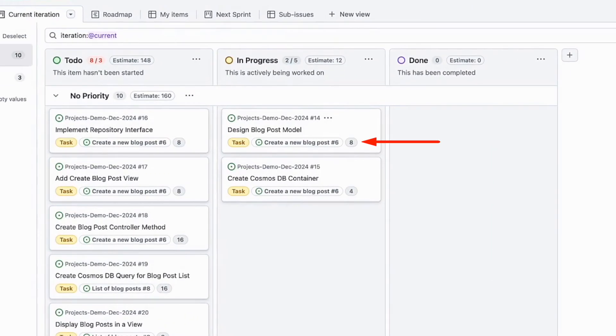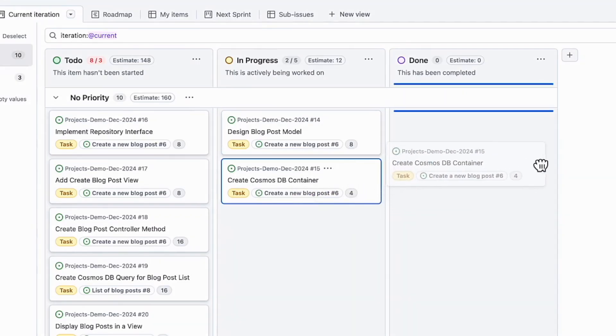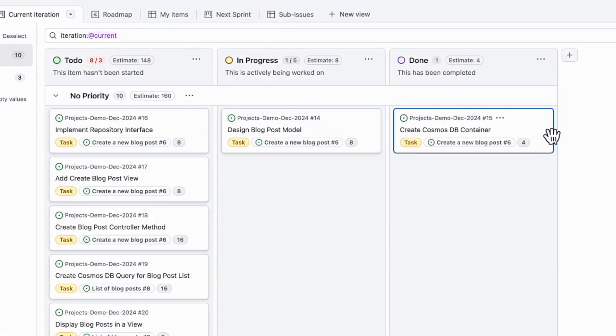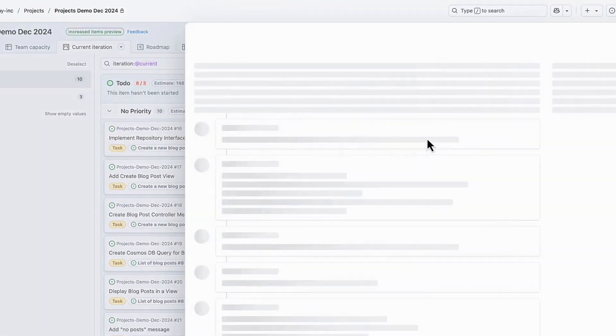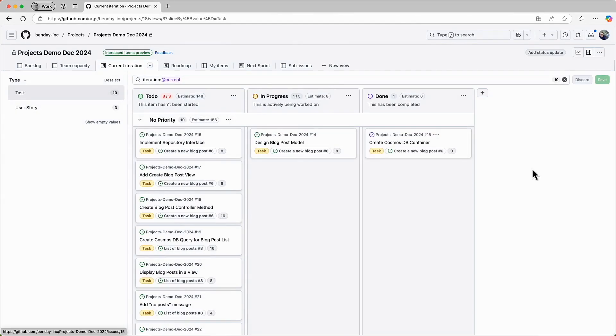As you can see here, the estimate value now shows us eight hours remaining. Let's say that the team discusses the progress on the create Cosmos DB container item and they decide that it's done. They're going to want to change the status to done and update the remaining work to be zero hours. Click and drag that card into the done column and that updates the status. Right now in GitHub projects, this doesn't automatically wipe out the estimated remaining work value. So you have to do that manually. Click on the title, open the editor, then go to the estimate field. Change that value to zero and then close the editor to get back to the sprint view.